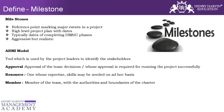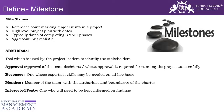M stands for Member — the project leader and cross-functional team members who are present in the project throughout. I stands for Interested Party — typically the head of the department who just needs to be kept informed, an FYI role. But sometimes, when the Approver is not able to support or extend help, the Interested Party becomes an important role — one level above the Approver.